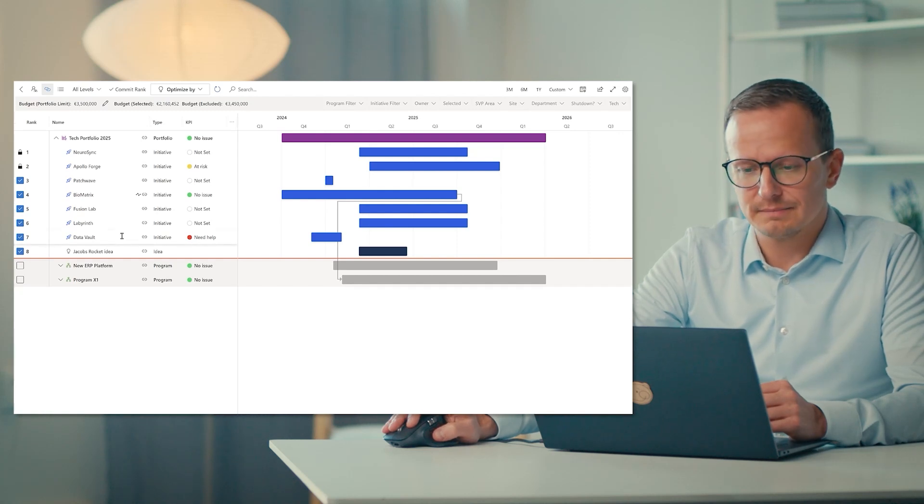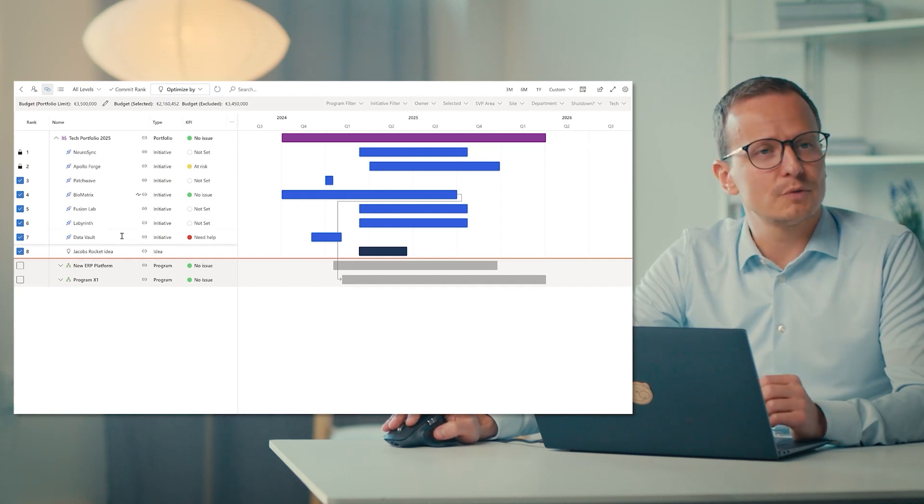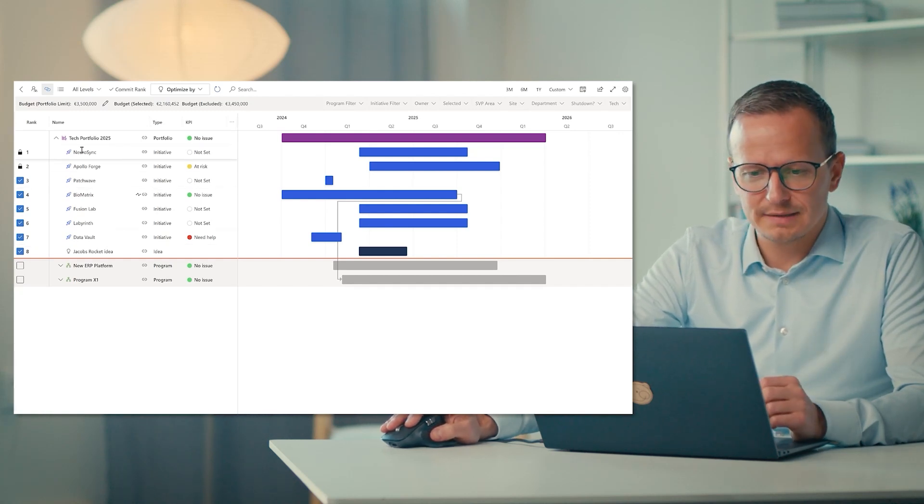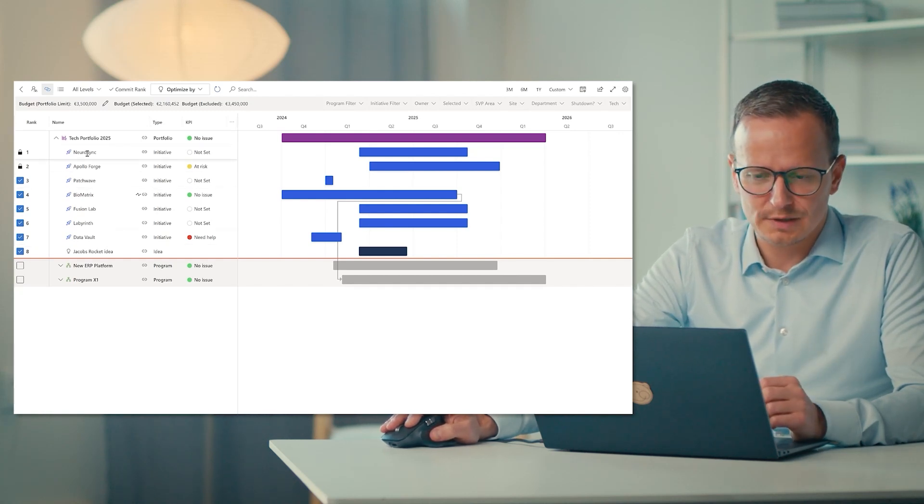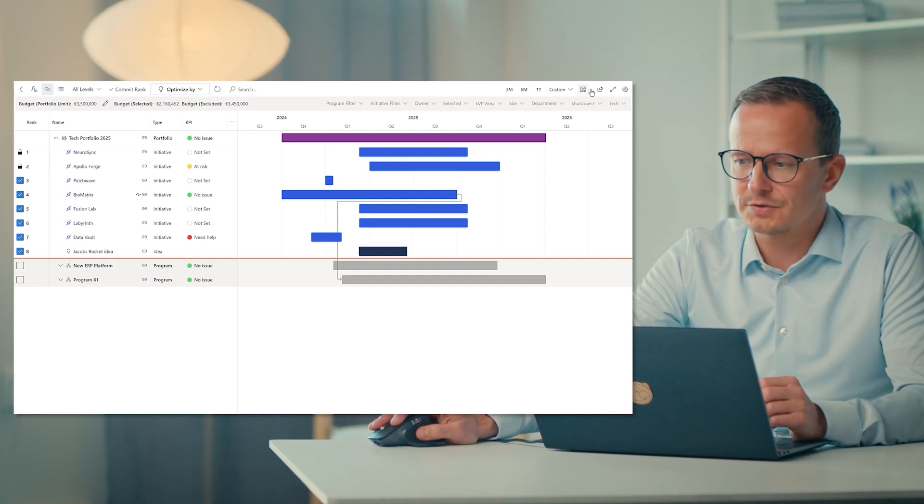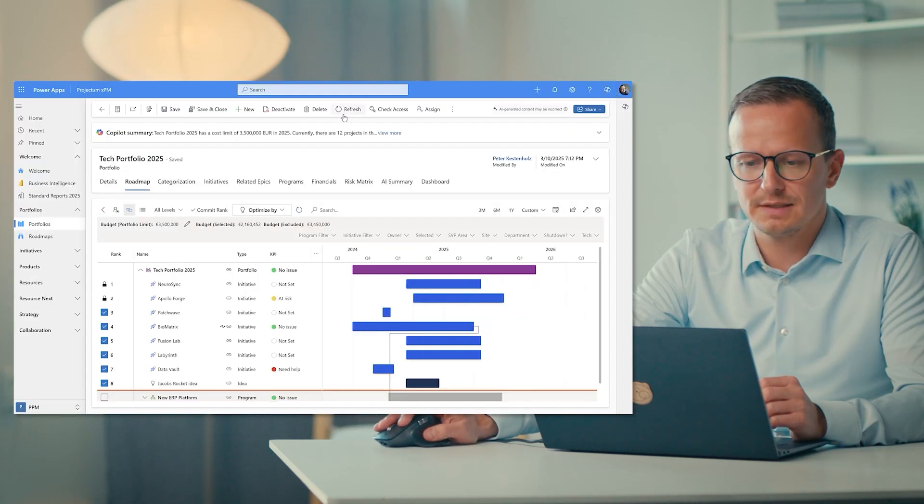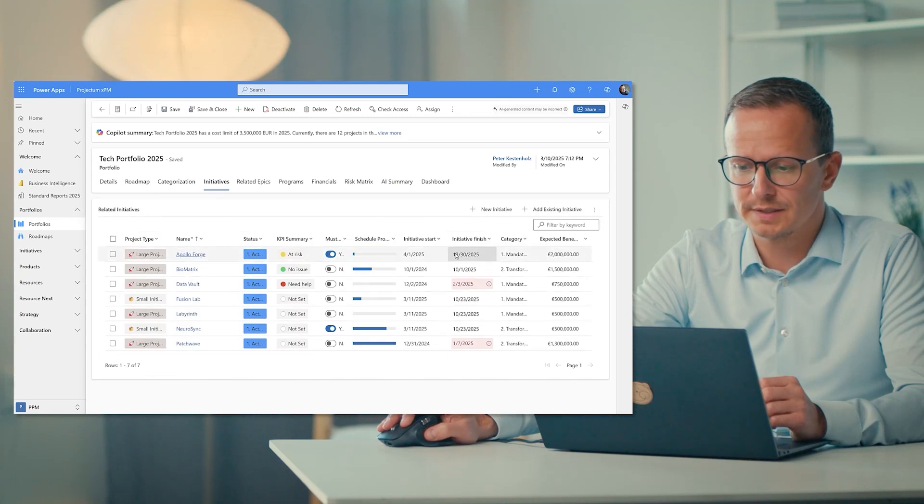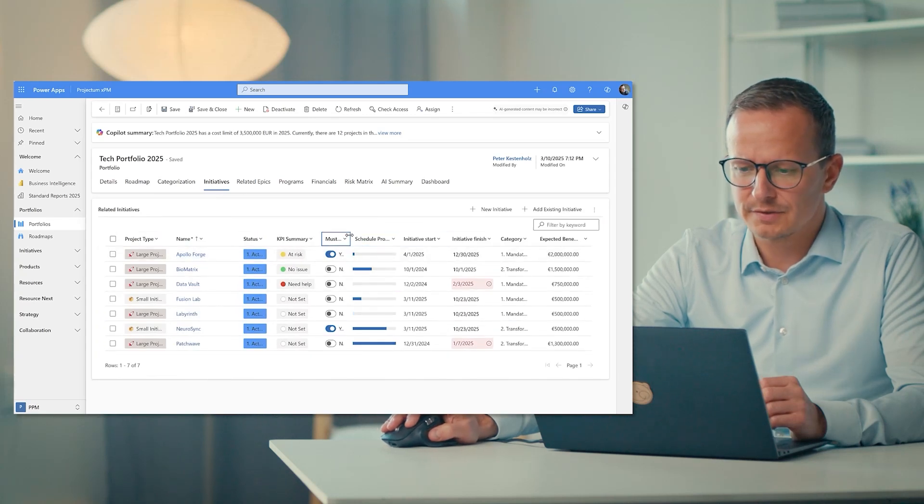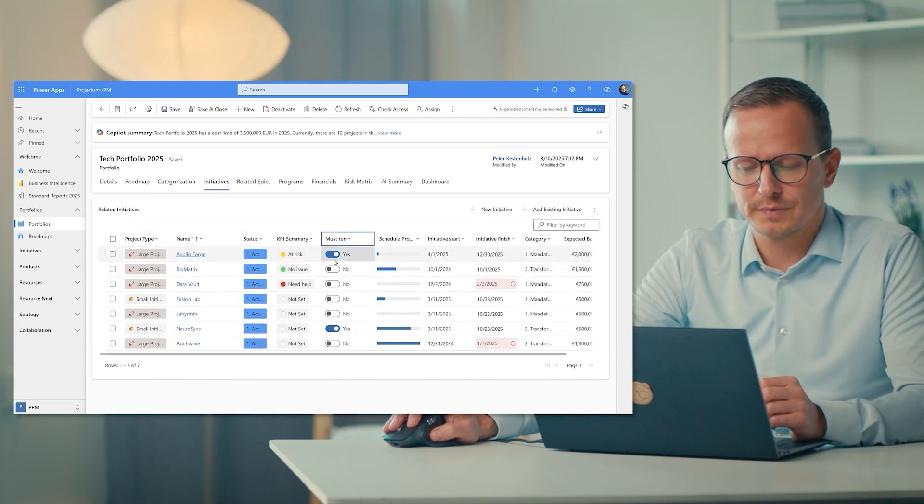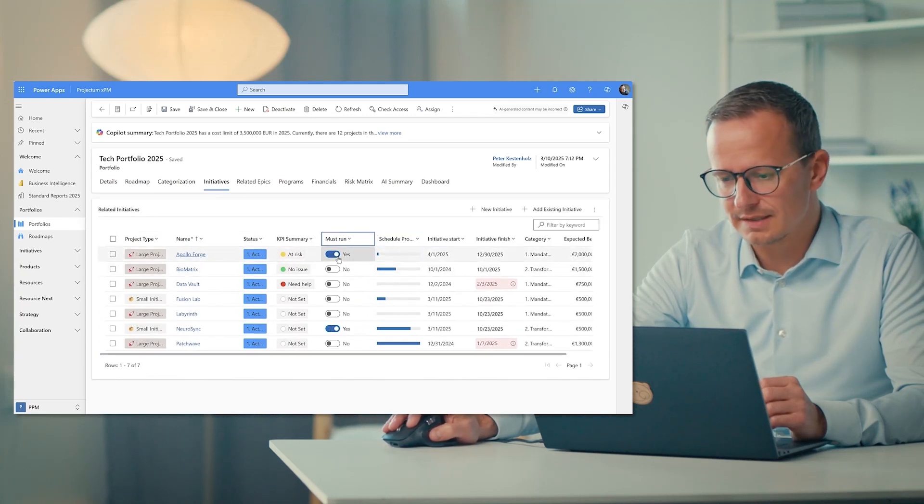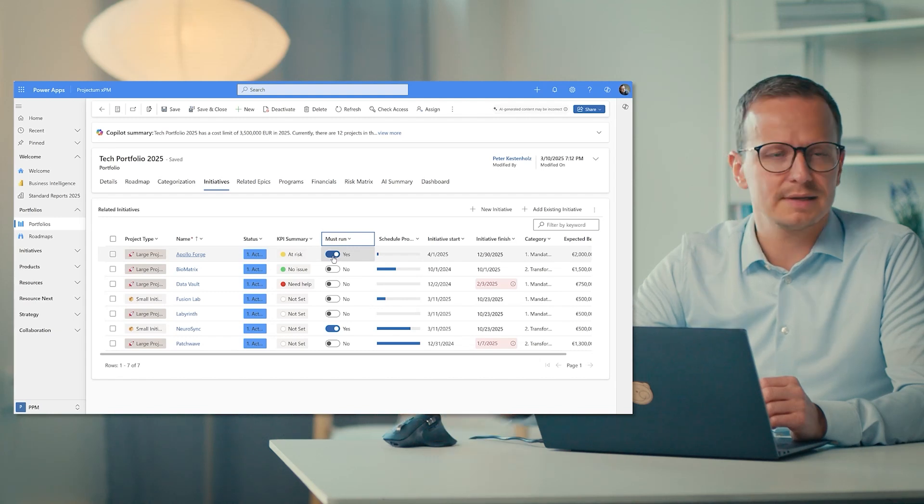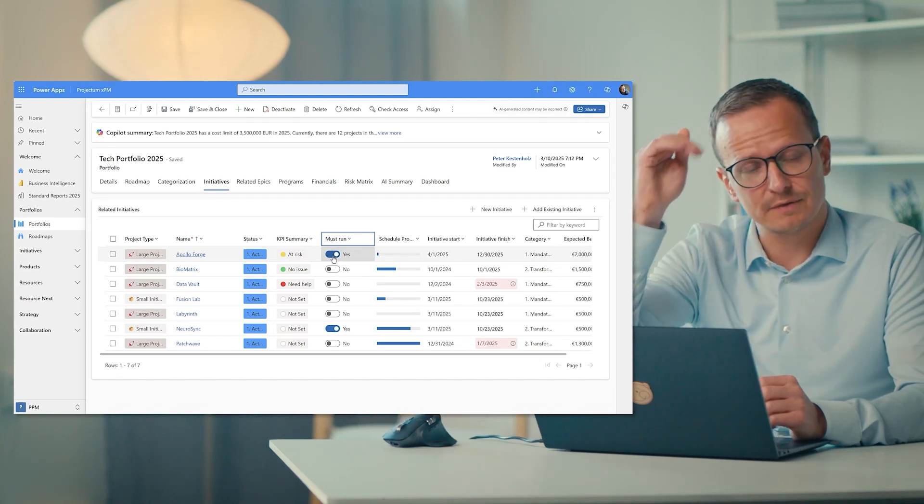And finally, and maybe even for some most importantly, if we look at these two ones up here at the top, these are locked. And the symbol locked essentially means that these are mandatory to execute. So if we just quickly go here, there is this thing called must run. So we can't prioritize these. They have to be done. That's why they are at the very top of the ranking.